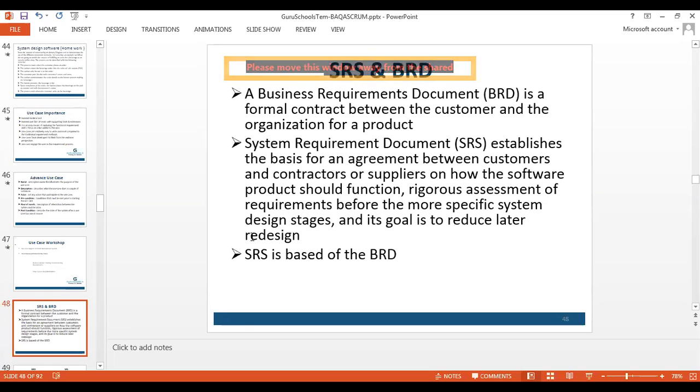That's how this document should be in an ideal theoretical scenario. But practically, yes, we keep improving. We talk to the client, if not daily, at least weekly, and that's how the Scrum is also planned. We have somebody called the product owner in the Scrum. I'm just giving you a head start. The product owner is the person who has thought of this idea, someone who can explain the vision of the development required, and he normally attends the Scrum meeting weekly. He devotes 1.5 hours weekly to make this product more suited to the current scenario, and that's how the product gets shaped in a normal agile methodology, right?